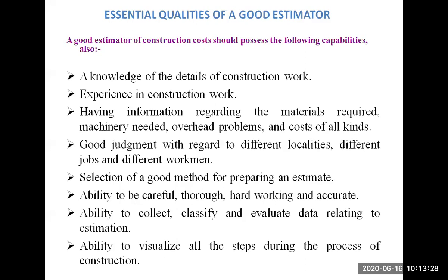Then, selection of a good method for preparing an estimate. As we discussed yesterday also, there are different methods to prepare the estimate. It may be a detailed estimate, approximate estimate, revised estimate, supplementary estimate, any category of estimate. We are going to select the good method. It may be the centerline method or the PWD method. So we should have a good method for preparing the estimate based on the site condition and the type of construction.